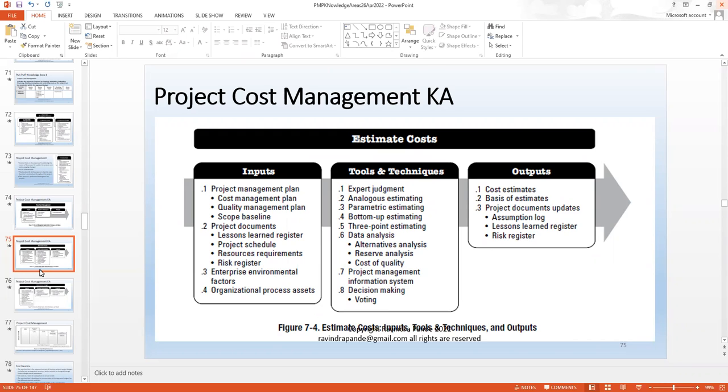Okay, and then there are various other things which help us out even within the organizations. We have something called knowledge management, right? The knowledge archival, where we normally try to understand if we have done a similar project earlier in our organization, who managed that, how he or she managed, what was the result, was it successful, unsuccessful, what I need to learn from there, and so on and so forth. So we pile up on our old knowledge and make sure that whatever we are doing as far as the planning, we don't fall on the same unsuccessful ladder.